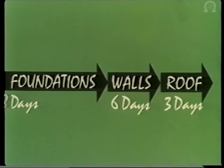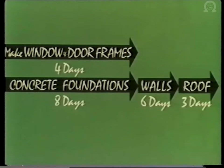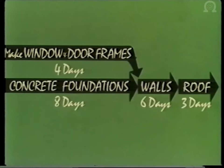Operations that can be done at the same time are shown by arrows alongside one another. When two or more operations must be finished before a third can start, they are drawn in this way. Arrow diagrams are the basis of critical path planning.